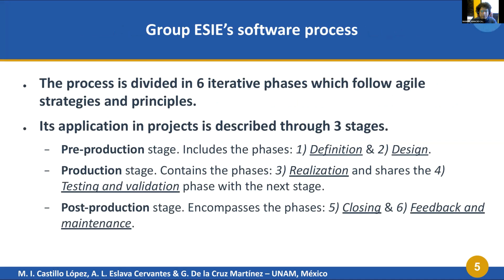The group SEA process is divided into six phases that occur iteratively according to agile strategies and principles. Its application in projects can be distributed through three stages. We start with the pre-production stage, which includes the definition and design phases. Next we have the production stage, which contains the process realization phase and shares the testing and validation phase with the post-production stage.